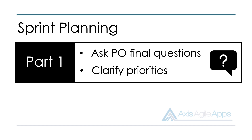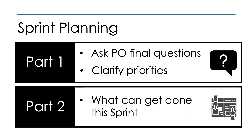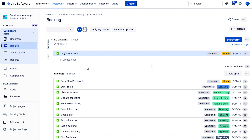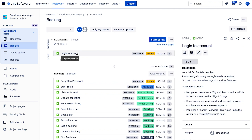So what's the second part of sprint planning? This is where we determine what we're going to get done inside the sprint. For the second part, we only need the scrum master and the delivery team. To determine what we can get done within the sprint, we need to understand how the work is going to get done. In this second part, we're going to discuss product backlog item by product backlog item and really delve into the detail, working in priority order from the top of the product backlog.